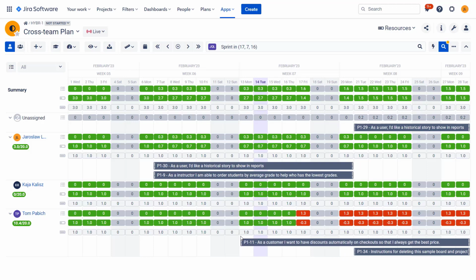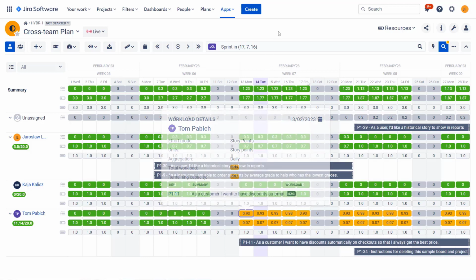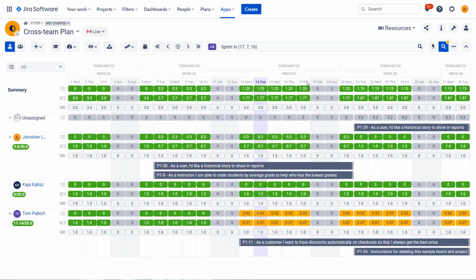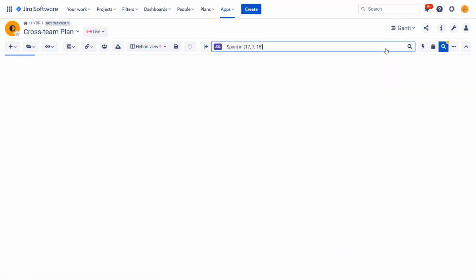We can expand the task. This will basically take the estimate of the task and divide it by more days. So now you'll see we're in the yellow, we're close to 100%, but not yet there. So it looks feasible. Basically, now we could work with that. So we can already see that for waterfall, it will be a really nice feature. Basically, we've changed something over here. We'll switch over to Gantt.